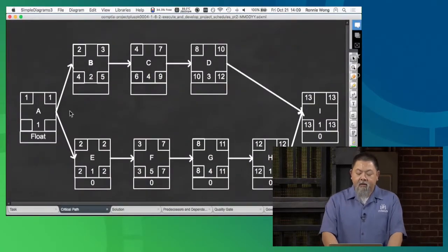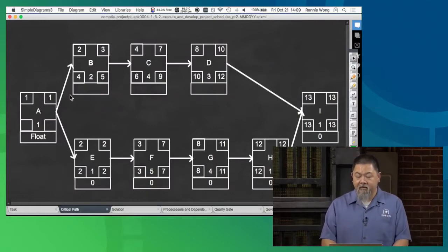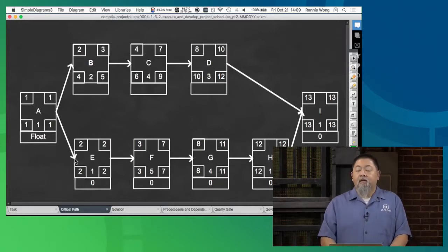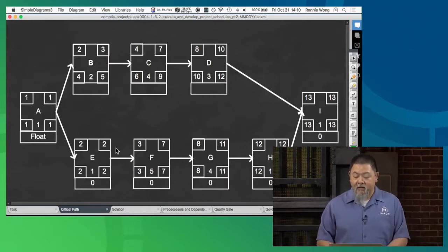And now, between the both of these, what is the latest finish that I can have for these two? Well, the latest one that I can have is actually 2 here, because I can't do this backward where I say this starts on day 4 when this one's supposed to start, or latest start is, on day 2 here. So it's here that this takes precedence where this becomes a 1, and then day 1 is right here.